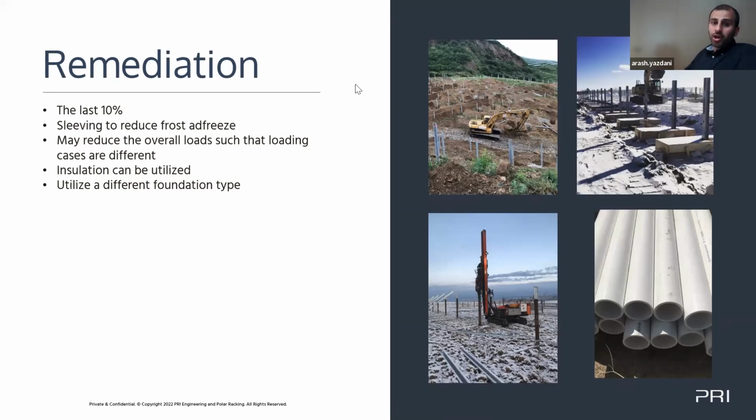However, overall, you'll probably find that the cost is going to be less at the end of the construction. During production, if we're working down a row and we start seeing low torques, we'll stop after 2 piles. We'll go to the opposite end of the row and work towards it. And then as soon as we find that soft zone again, that's where we'll stop. And then we can infill that area with a larger helix or whatever it may be. So we're delineating during production as well.